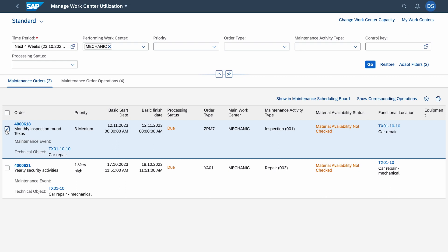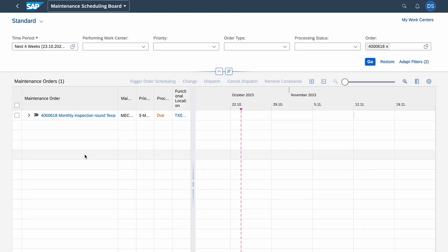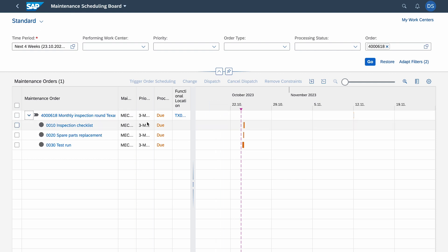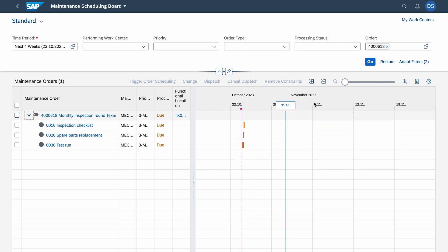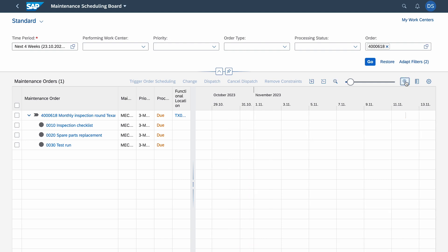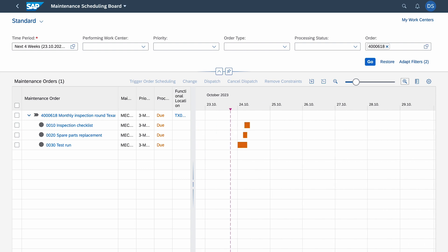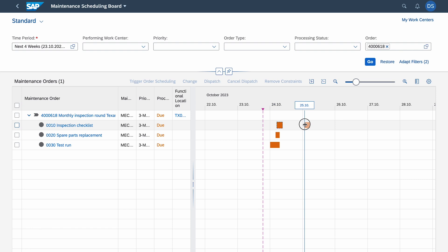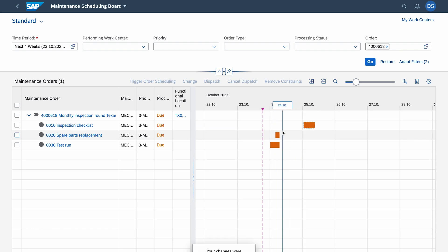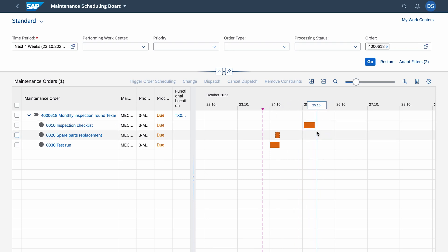I'm in the maintenance orders tab and I select the first order because I want to show you something called Maintenance Scheduling Board. It's like a Gantt chart. If I go inside you see some nice graphical view of the order. I click this icon to show you the operations. Now with drag and drop method we can reschedule these tasks. I will zoom in to show you the current week, 24th of October.